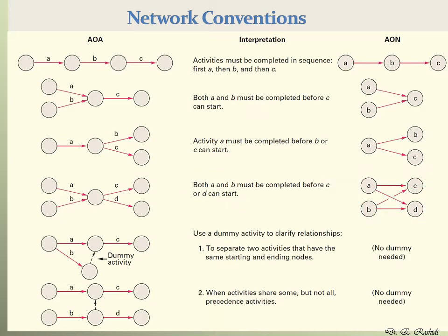As you saw before, for the AON, we had an example where we added a dummy node, and that was the start node. We show it by S. So S start goes to A and B. S doesn't really exist. It's a dummy node that we need to add to start the project. This is not only true for AON. Sometimes we need to do this also for AOA, but instead of a dummy node, we have to add a dummy arrow.